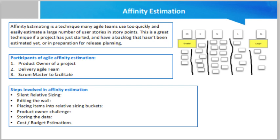Cost budgets allocate portions of the total to individual tasks based on team velocity. For example, with 7 members working at a billable rate of $500 per day, and the project needing 20 iterations of 20 days each: cost per engineer for 10 days is 10 × $500 = $5,000. Cost per iteration is $5,000 × 7 = $35,000. Total project cost is $35,000 × 20 = $700,000.